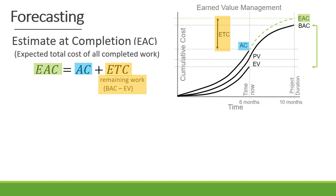In forecasting, our estimate at completion is the expected total cost of all the completed work on our project, and it is calculated by adding our actual cost plus our estimate to complete, which equals our estimate at completion. Our estimate to complete represents the remaining project work, and it is calculated by subtracting our earned value from our budget at completion at a specific point in time.